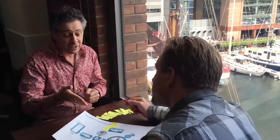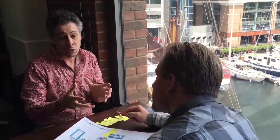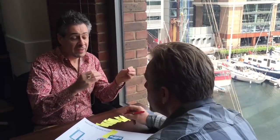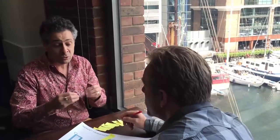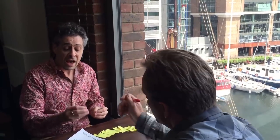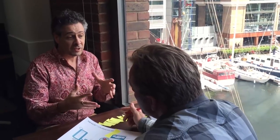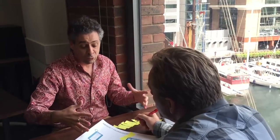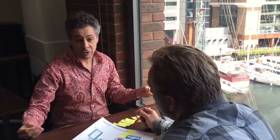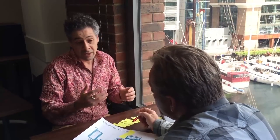But before they get together as individual teams, we're going to have a bit of a coordination meeting where representatives from each team get together to highlight the challenges that the whole is having. And hopefully that information will then feed into the individual teams' retrospectives so they can come up with solutions from the people who are closest to the work. After teams meet, to make sure that the learning that happens from the individual teams gets spread out to the rest of the group so the whole can improve, we have another coordination meeting where those ideas are gathered and then shared. And that kind of ends off the sprint.